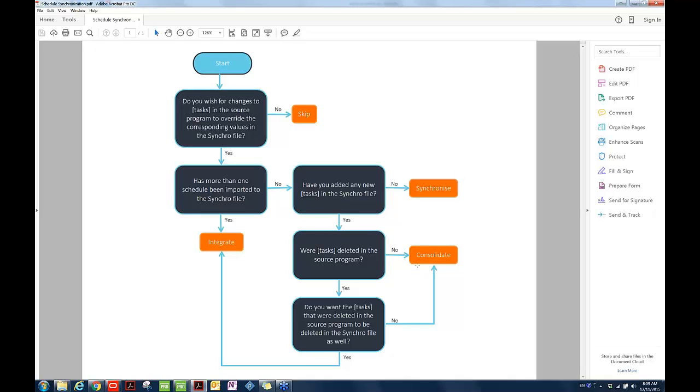The third synchronization option is Consolidate. Consolidate is similar to Synchronize, and the Consolidate option ensures that the attributes within the projects are not going to be deleted. That is to say, if any attributes are deleted in the source project in P6, it will still be maintained or remaining intact in the target project in Synchro.